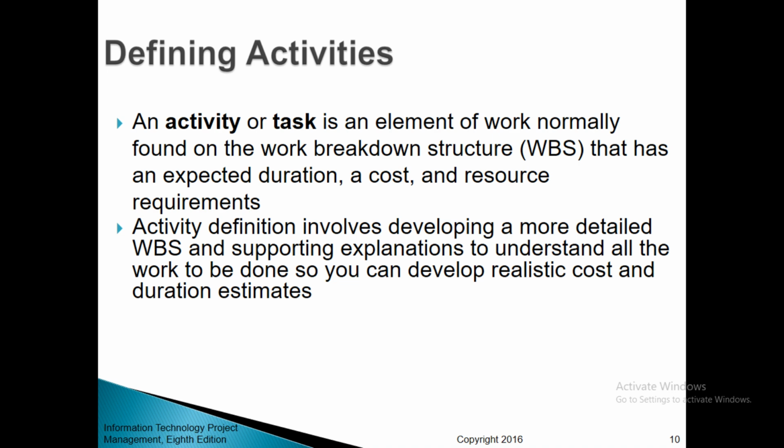Defining activities. An activity or task is an element of work normally found on the work breakdown structure or WBS that has an expected duration, cost, and resource requirements. Activity definition involves developing a more detailed work breakdown structure and supporting explanations to understand the work to be done so you can develop realistic cost and duration estimates.